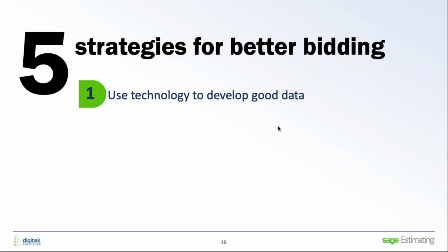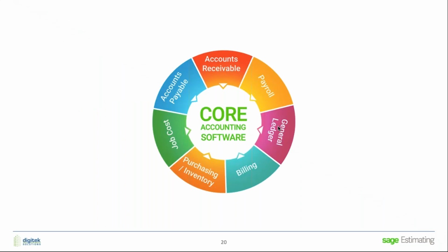And what I mean by that is that we have to start with a core accounting system. And that accounting system has to include some sort of job costing. And I'm not talking QuickBooks type job cost. I'm talking about something more robust, something that will really get us the data we need so we can identify where our labor numbers are, where our material costs are going, and where our production is. And from that, we can expand that out to the project side.